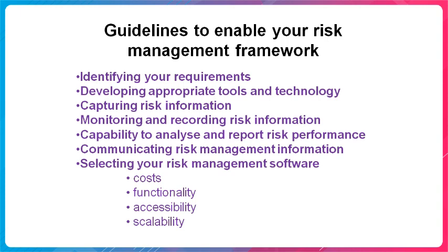Next we see monitoring and recording risk information. Many organizations use tools and technology with functionality to generate risk reports with information about certain things. They are extreme risk, the total risk profile, reasons for risk rating movements, risk treatment actions, assurance coverage of key risk, detailed risk register, and new and emerging risk issues.